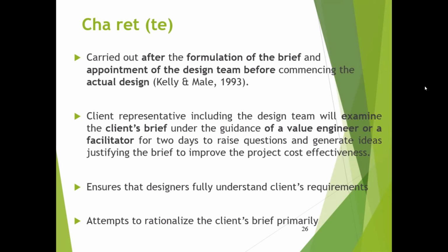Okay, so this particular approach or exercise is carried out after the formulation of the brief, right? So basically we appoint the team to study the brief in detail, under the guidance of a specialist, that is a value engineer or a facilitator, for 2 days, to raise questions and generate ideas, justifying the brief to improve the cost effectiveness.